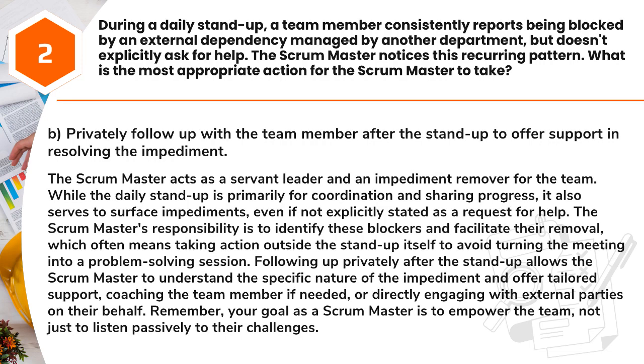Answer. B. Privately follow up with the team member after the stand-up to offer support in resolving the impediment. The Scrum Master acts as a servant leader and an impediment remover for the team. While the daily stand-up is primarily for coordination and sharing progress, it also serves to surface impediments, even if not explicitly stated as a request for help. The Scrum Master's responsibility is to identify these blockers and facilitate their removal, which often means taking action outside the stand-up itself to avoid turning the meeting into a problem-solving session.